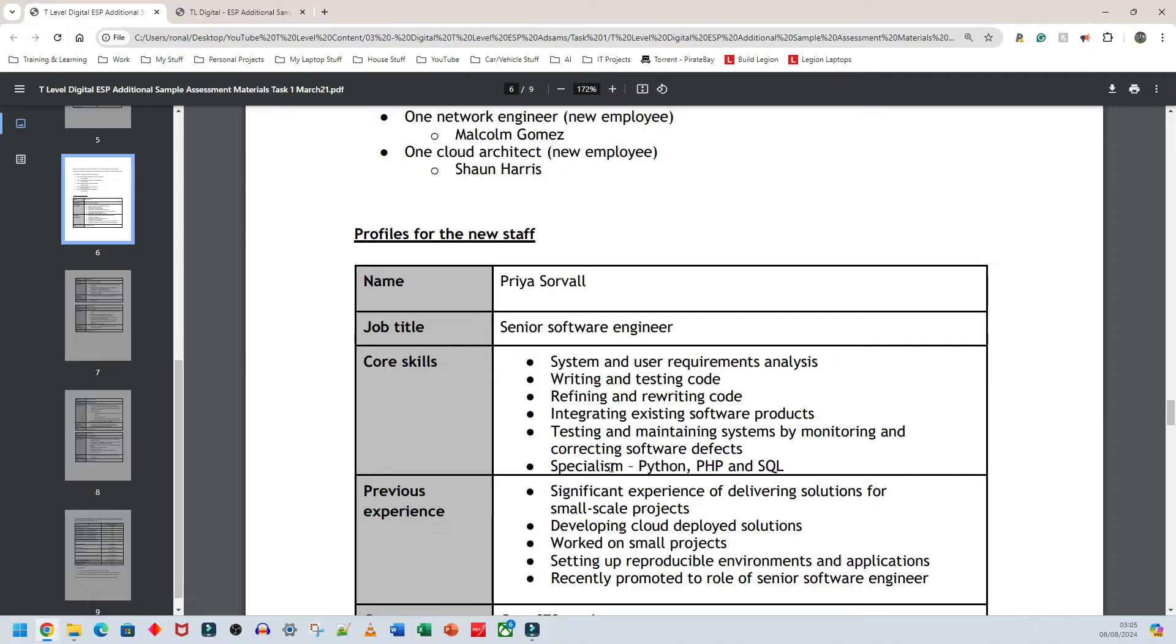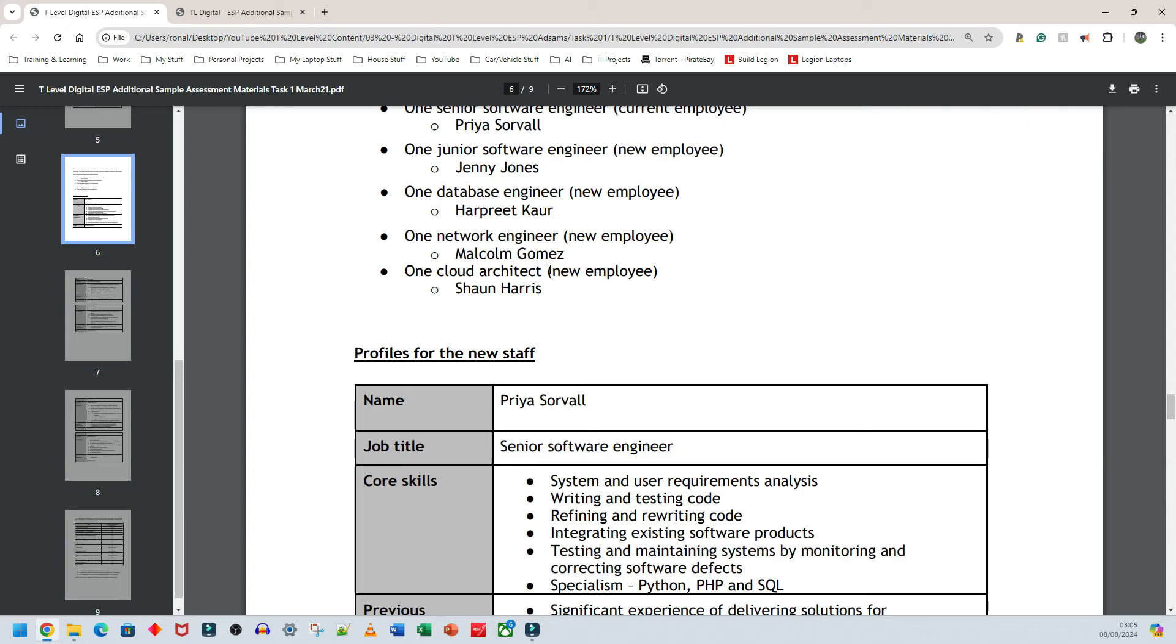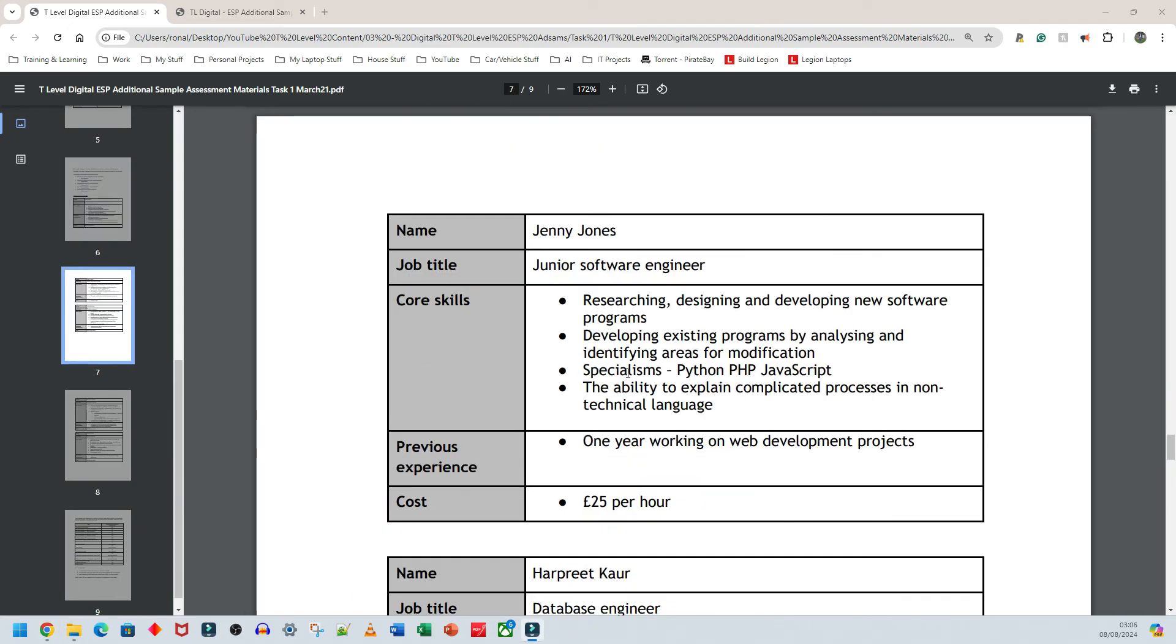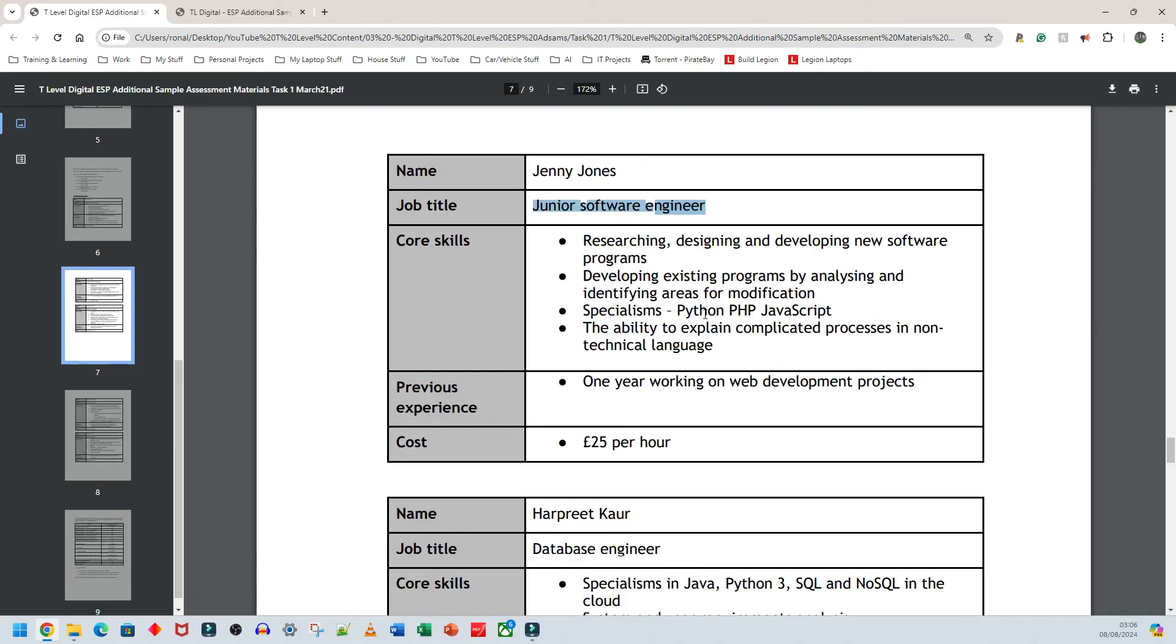You should never, never ever have a junior person by themselves. That's number one. Or you could also have a senior internal person working on something and also have a senior external person. Again, a contractor is not somebody who works for the company. They are an external entity, an external person. They don't work for the company. So just a quick recap of what I just said: Never have a junior person working on something by themselves. Even if you have the junior person working for 10 hours on a thing by themselves, you should have a more senior person who has experience in that area come and check over it for maybe two, three, four, five hours. Never have them do anything by themselves for the entirety of the project.